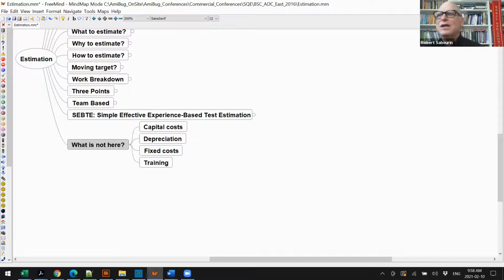Have that discussion, because some programming design alternatives will require dramatically different data preparation activities. And I see testing teams with 80% of their effort on data collection, preparation, management, validation, and they don't even include that in their estimates. Of course you should estimate it. Identify tasks related to it on a story-by-story basis. That's how I like to do it.